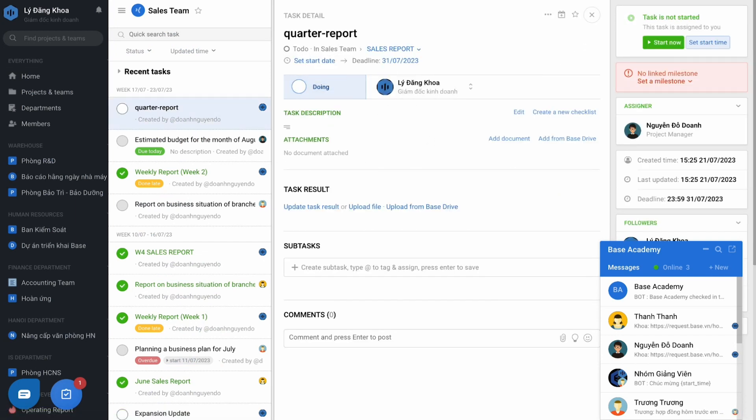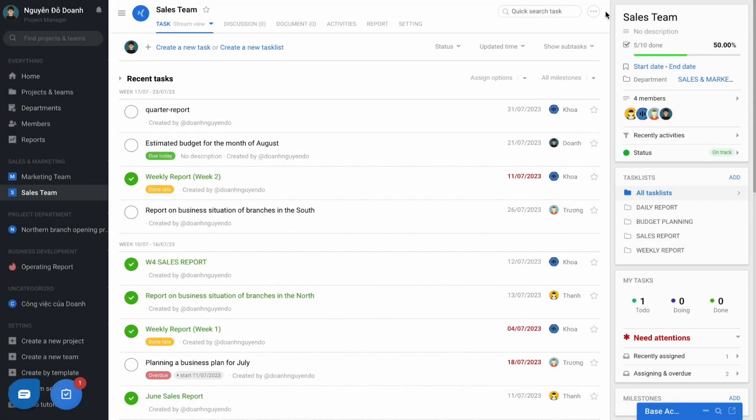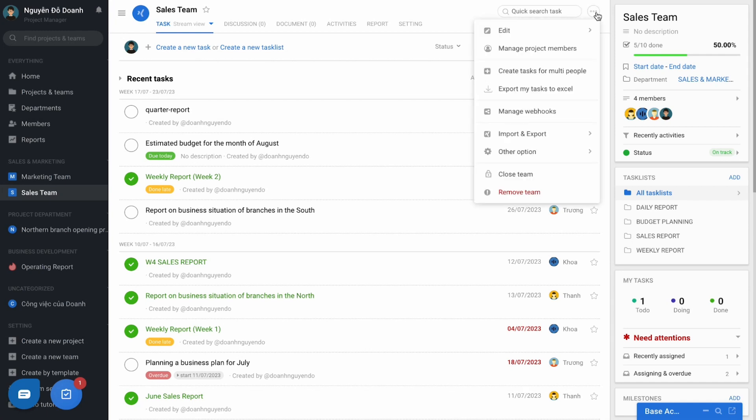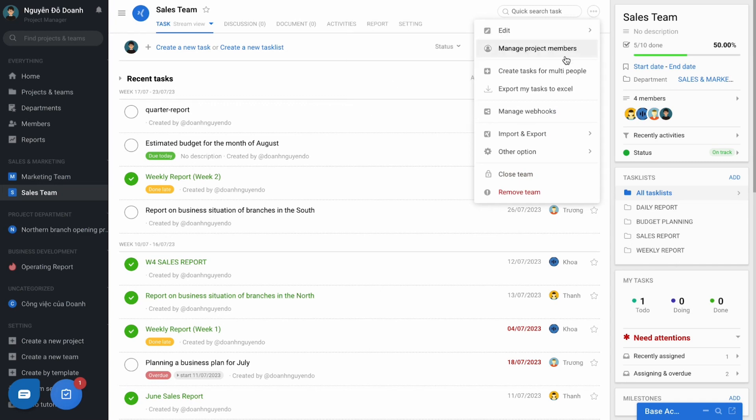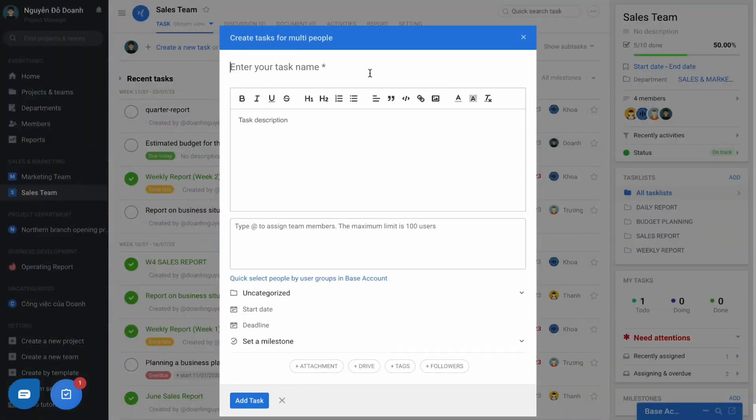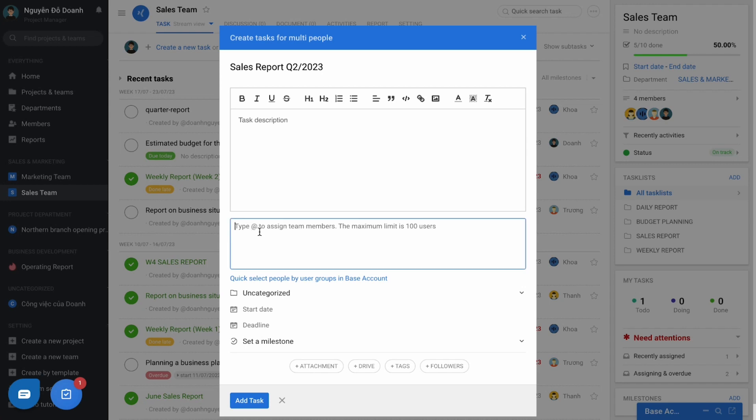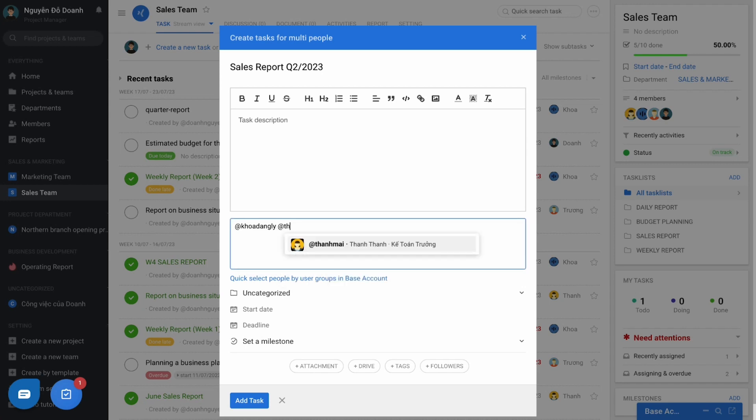In addition, if there are similar tasks to be assigned to many people at the same time, please select three dots here and use the feature create task for multiple people. The same operation as above, but you can assign to many people at the same time.